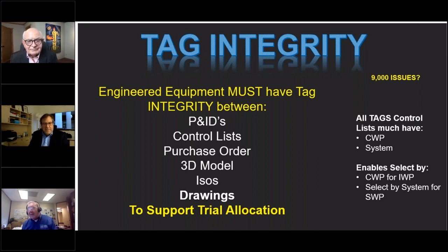We have more criteria in there. The very first model review is to make sure that we have the equipment and major structures set, with maintainability, operability, constructability, installability, things of that nature. The second one is looking at the major piping systems and control points. Do we have those in place, again for operability and maintainability? And the third one starts looking at your piping.